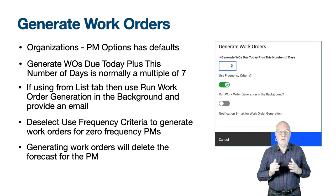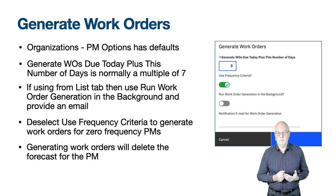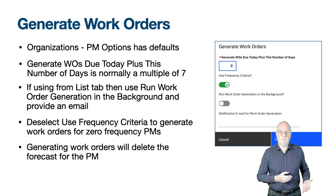When you generate work orders and the PM has a forecast, you will receive message BMXAT0231E: a forecast exists for this PM — generating a work order will delete the forecast. If you are using PM forecasts, you need to consider implementing both PM work order generation and PM forecast generation as background cron tasks. We will discuss PM forecasts in an upcoming video.